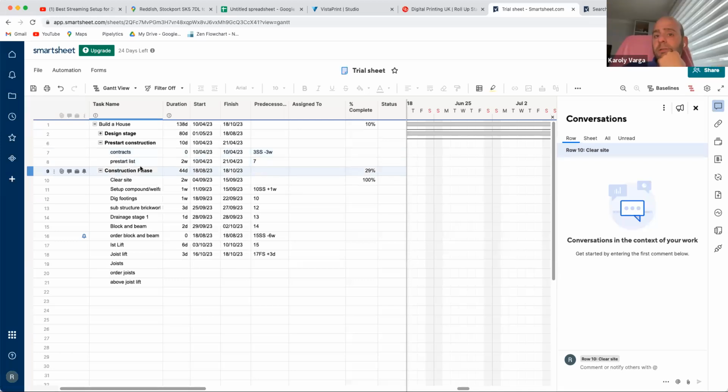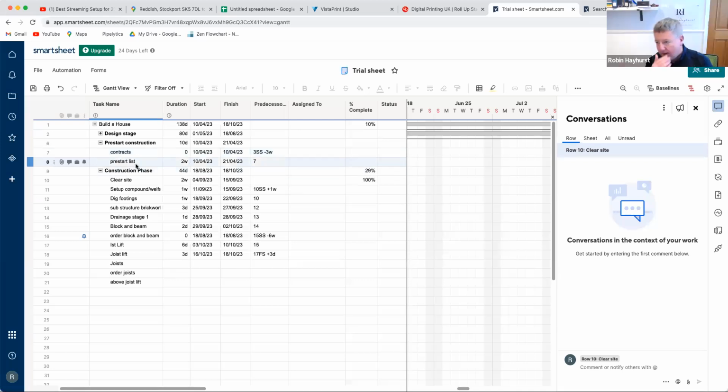I love programming. I'm quite addicted to it, to see if I can get it right, but you need a lot of information to come into you. So things like asking subcontractors how long it's going to take, making sure you know how long the supplier is going to take to deliver stuff, and also asking subcontractors what their lead-in time is.